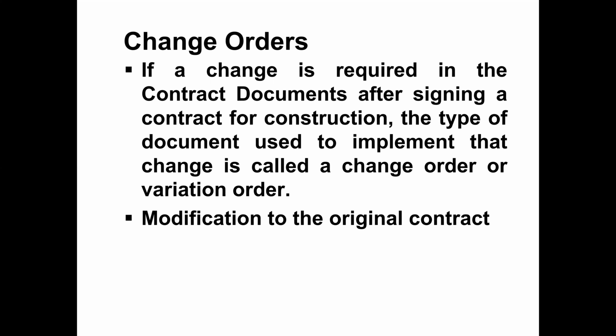Then the change order will be signed, and it will be added that now the final price of the contract is this and the final time period is this many months. So it means your last change order will be your final contract. Your last agreed change order will be your final contract.